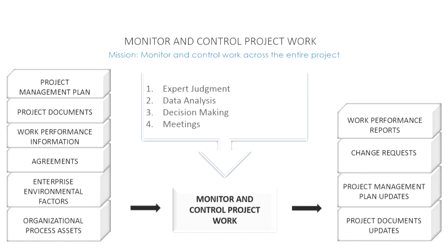Okay, so all of that stuff is important, because in monitoring and controlling project work, this is where you think, what are we going to do about that? And when you've decided what to do about that, that is when you get a change request to effect a change on the project, to bring the work back in alignment with the plan, or to just repair a defect altogether.